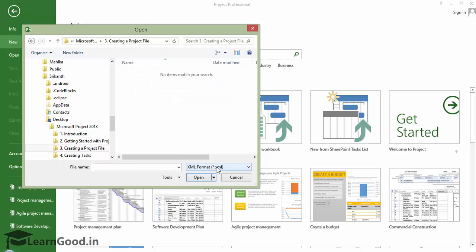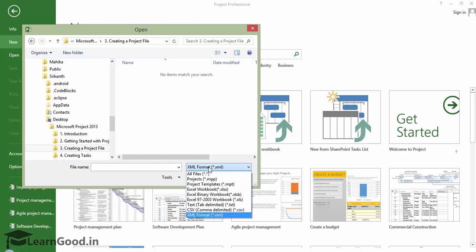But my file does not show. This is only because, by default, the file type is selected as XML. I have to change that to Excel Workbook. And there it immediately shows.